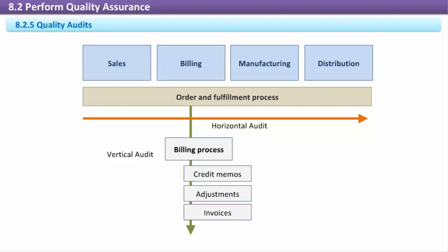Quality audits can also be required for contractual or regulatory obligations, and in those cases the party to perform the audit is usually specified in the contract or regulation. In other cases, quality audits may be performed by a consultant or a member of the performing organization's quality department, or the customer may also perform quality audits of the project.